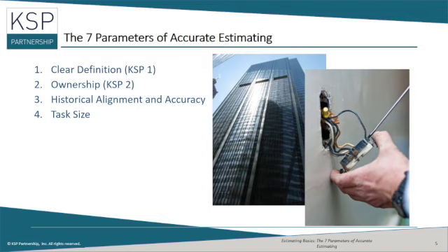install an outlet. When a team member is having difficulty estimating a task, one of the tricks I use to help them is to have them create a checklist of all the steps that they will have to do to complete the task. This generally does the trick and I get reliable estimates. This technique also helps identify misunderstandings regarding the scope of the activity. Essentially, it's creating a deeper work breakdown structure.